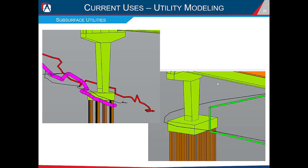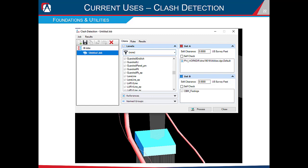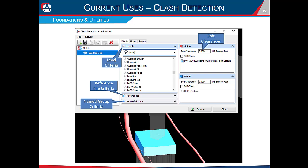We also use OBM to model underground utilities — using 3D data from survey files with X, Y, and Z data, or 2D utility files with only X and Y data where we estimate the Z. Clash detection is another great use: the biggest application is checking for clashes between utilities and foundations. Criteria options are highly customizable — we can check between levels, reference files, or named groups, check for hard clashes or soft clashes to ensure a minimum clearance distance. These clash detection reports can be saved and run daily for cross-discipline coordination.